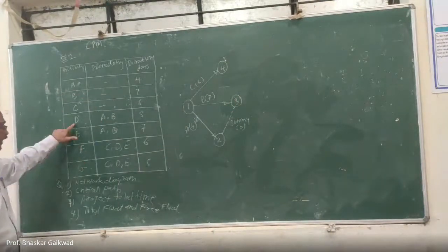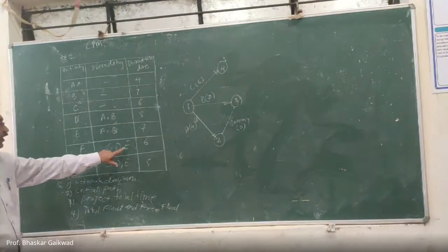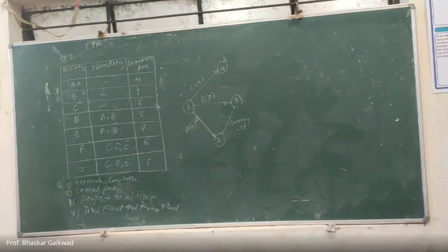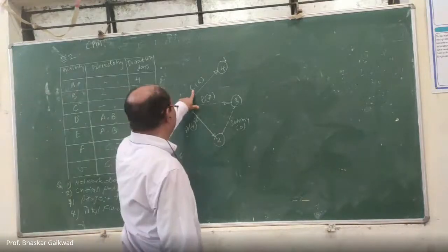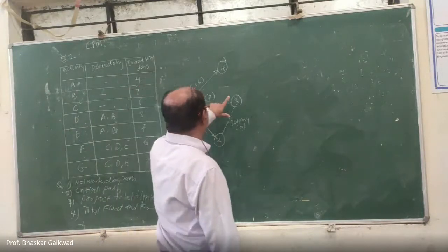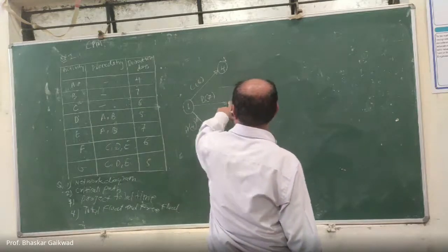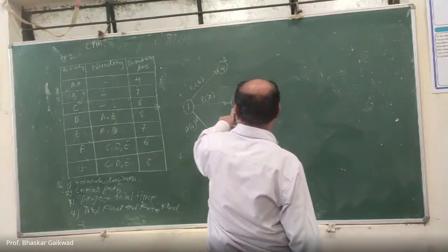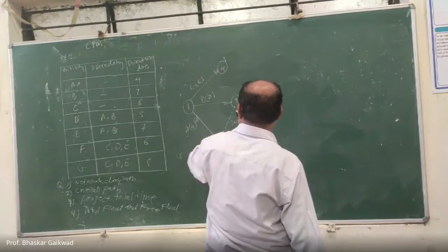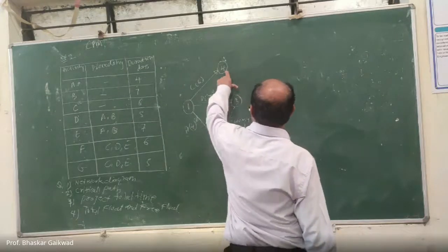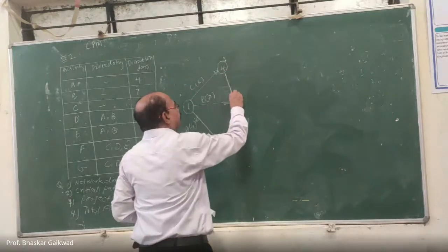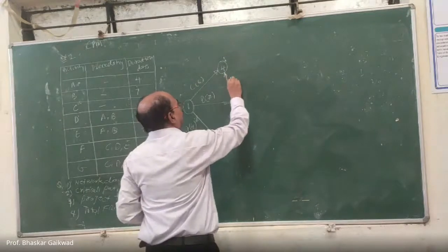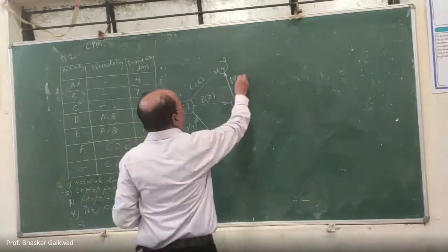Once again there is a problem with D. C, D, E will be at one place. So already C is here. Now if we start D from here, because at this place there is the end of A and B, since by using the dummy activity we have brought A to here, you can draw here, and then C and D will be here. This is the activity D. What is the total time for D? 5.